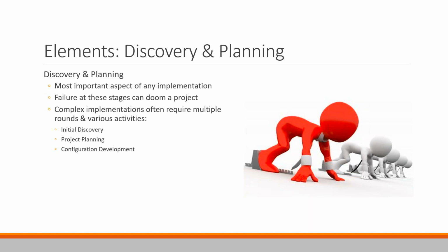And because of that, if there are problems at this step, it's going to often doom an implementation project. If you pick a system that doesn't meet your needs, if you maybe pick too broad a scope to start with, you can end up with a system that's too complex and too hard to use, and then ultimately it fails to get off the ground.